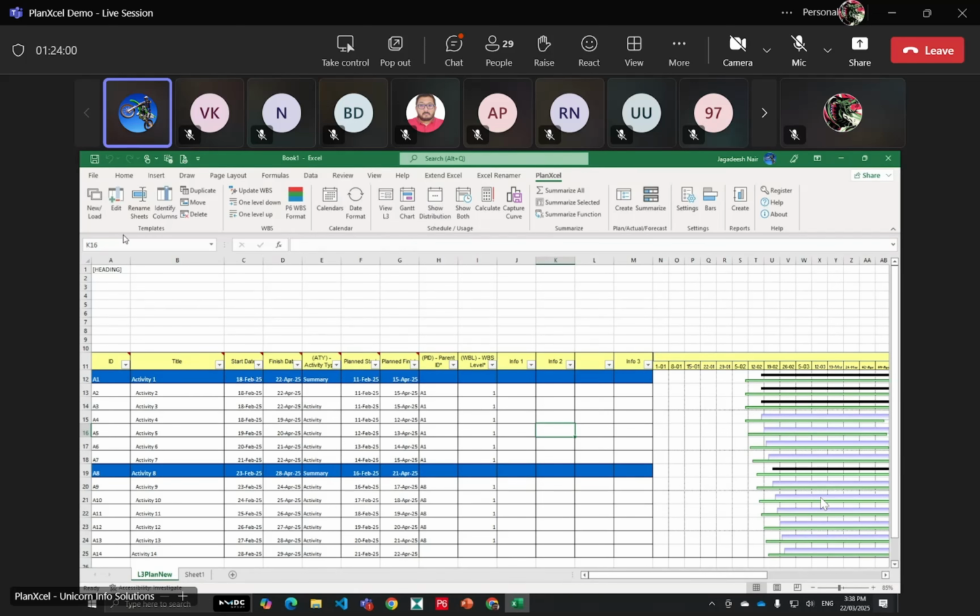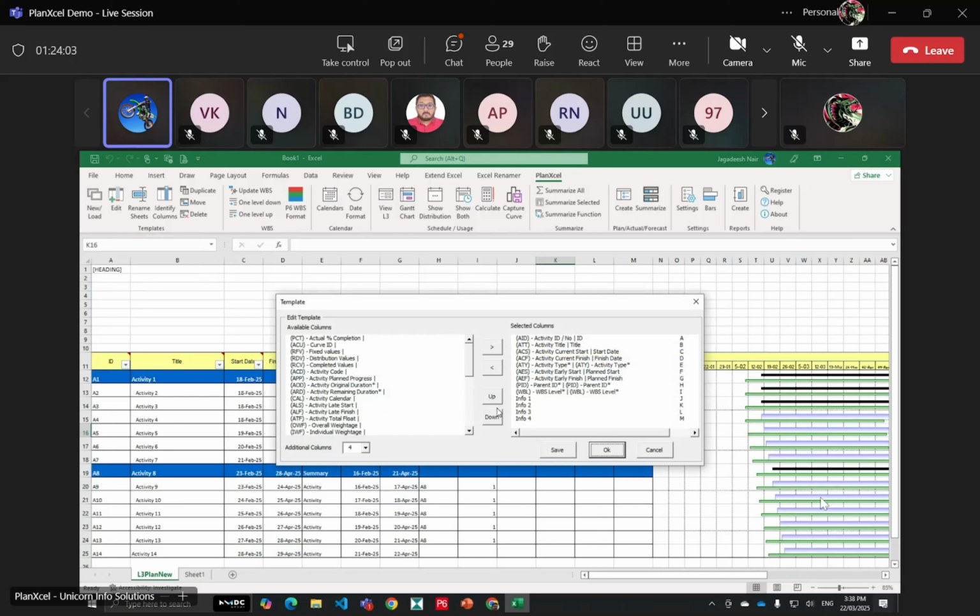So in order to distribute a resource, you require distribution values. You can do distribution in two different methods. One method is called the fixed values, where depending upon the durations you are setting in terms of start and finish, the quantity you're setting will be continuous. There is no change in the quantity irrespective of whatever activity you are doing. This is mainly used when you are using deployments in terms of equipment, where irrespective of whether the concrete is there or not, you need a concrete machine. So like that, if you want to use it, you can use the fixed values method.